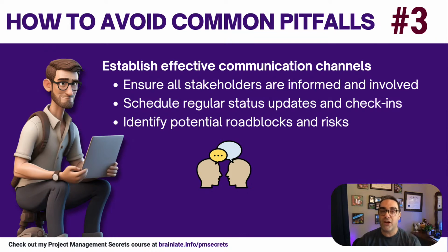So you need to know, who is it that needs to be informed? What is it that they need to be informed of? Through what channel are you going to be communicating with them? Is it once a week in-person meetings? Is it going to be posts on a Slack channel? Is it going to be emails? Is it going to be all of the above? Like, what is it exactly? Is it just going to be a check-in, or are you going to have actual working sessions with these people?